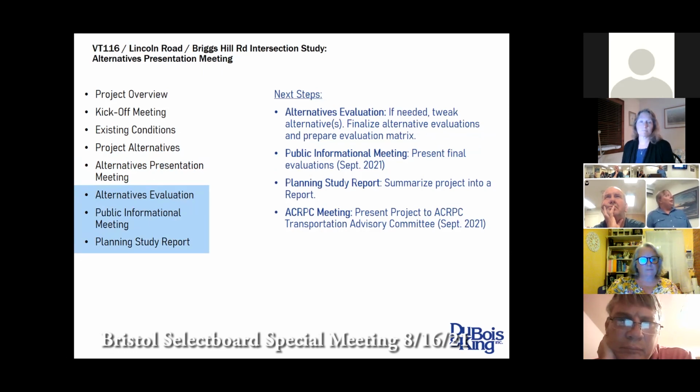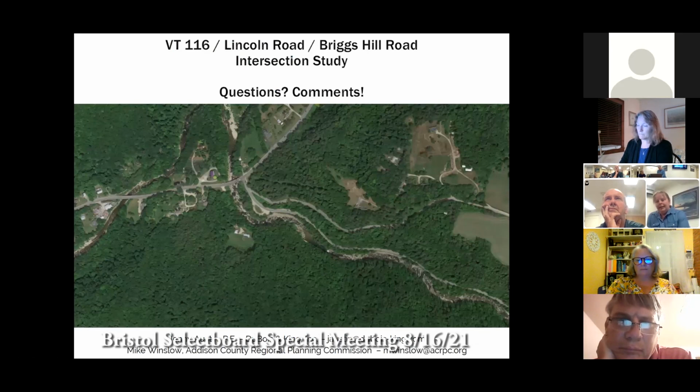And then we'll be having one more public meeting, likely in early September. We don't have a date yet, but we'll have that soon. In coordination with that, we'll be working on the planning study report, which will be the end product for this project for the town to move forward with. And then the last meeting is with the RPC. Typically, projects with this funding source through the RPC are presented back to their TAC committee at the end of the project, to summarize the project to them. That is all I have, but any questions?